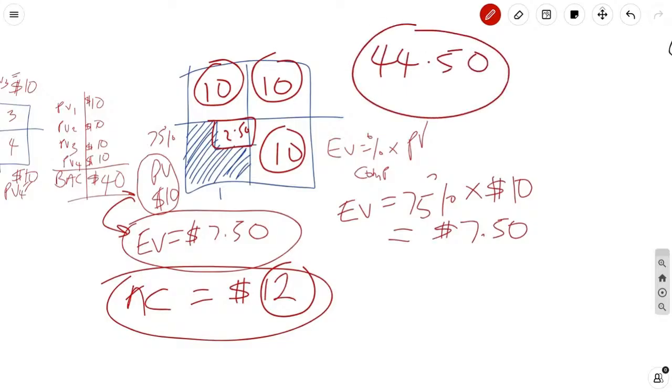Now, if we look at a worst case scenario, we could say, well, we spent $12 and we didn't get done. And if we look at the rate of spend and we say each quadrant we spend $4, we can say we're not going to spend 250, we're going to spend 4 for this. So your estimate could then be, well, $16 for each quadrant times 4 is 64. Are you getting the idea? So the idea is to look at the current state, and based on your current state, you understand what your end state will be. And EAC is your end state.